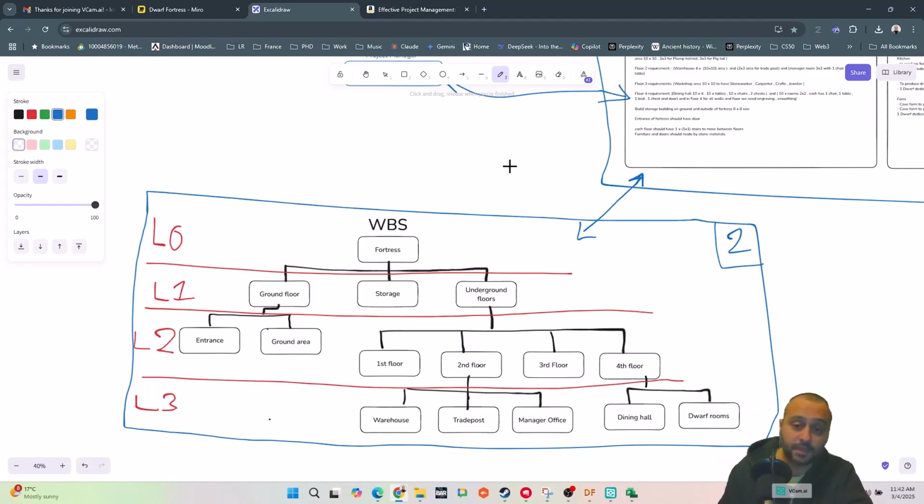It can also happen. It's normal that they forgot to mention the point while writing the contract, and later on when you are in the details of planning, you notice that this part is missing, and you need to include it. Okay, you discuss with the stakeholders, project owner, project customer, and they need to agree that either you have to include it or exclude it.